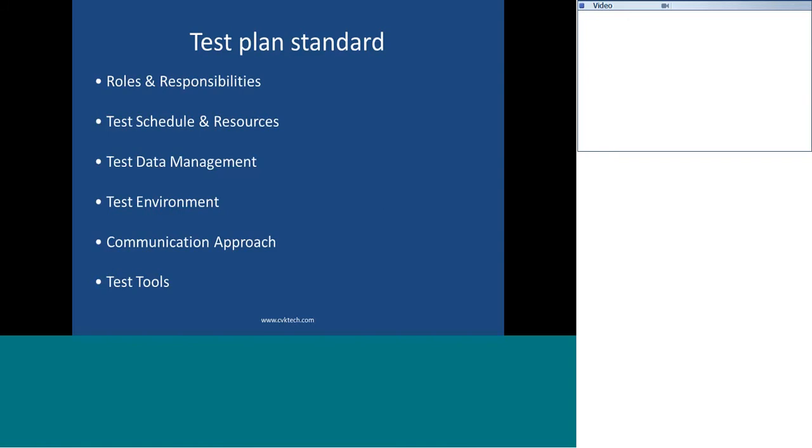If my testing effort requires automation knowledge and communication, I'll have two columns and I'll mark whether the resource is capable of doing automation testing or whether his communication skills are good or not. It's just a tabular format to give an idea of what skill set we have for all the resources. So it will enable good planning.